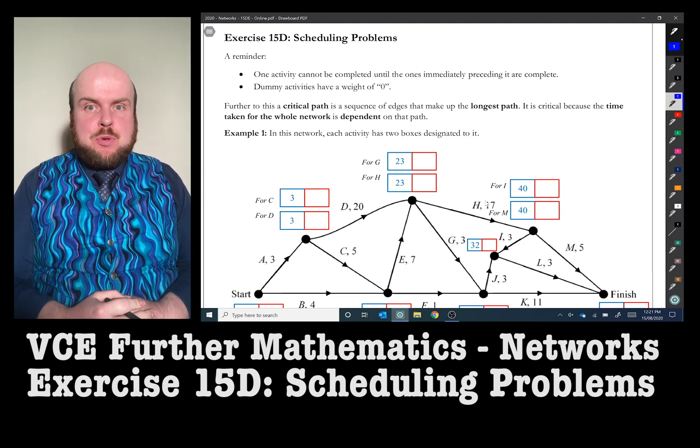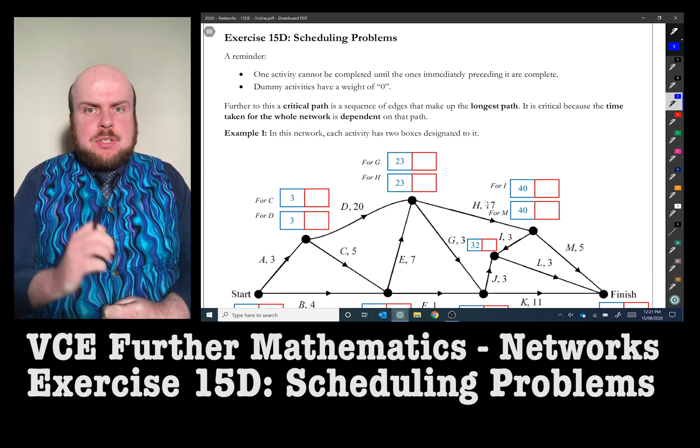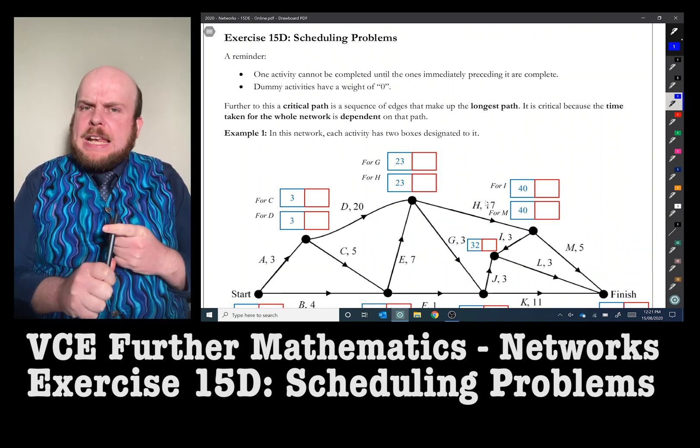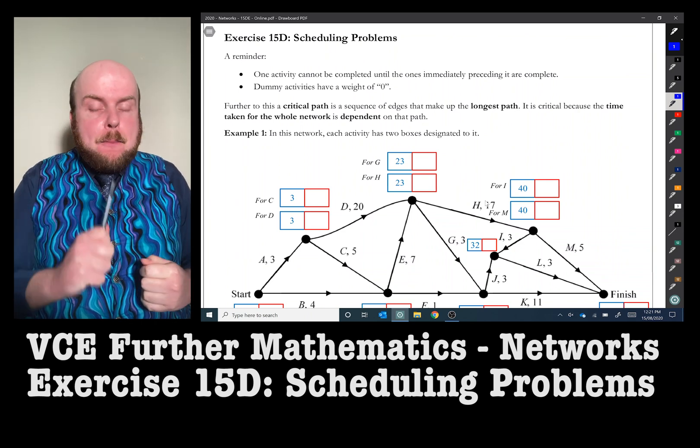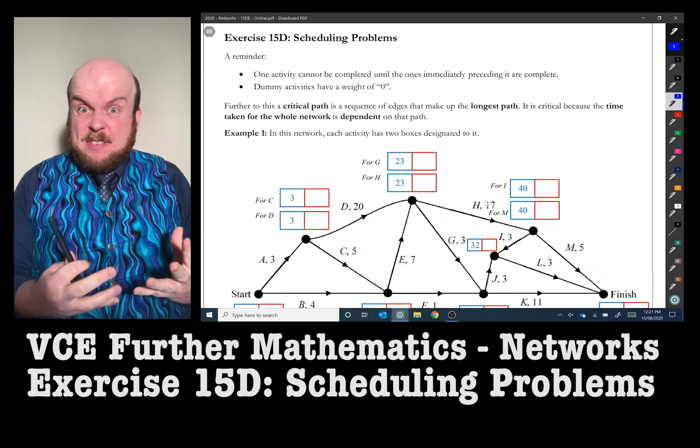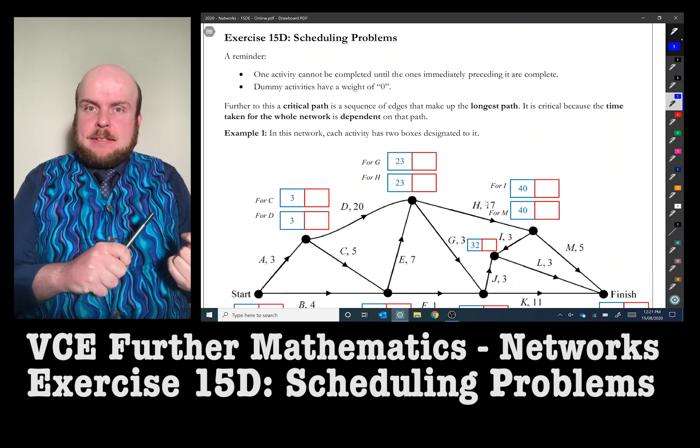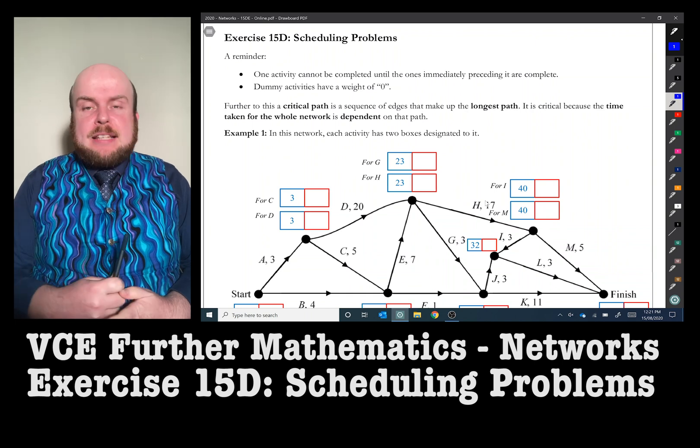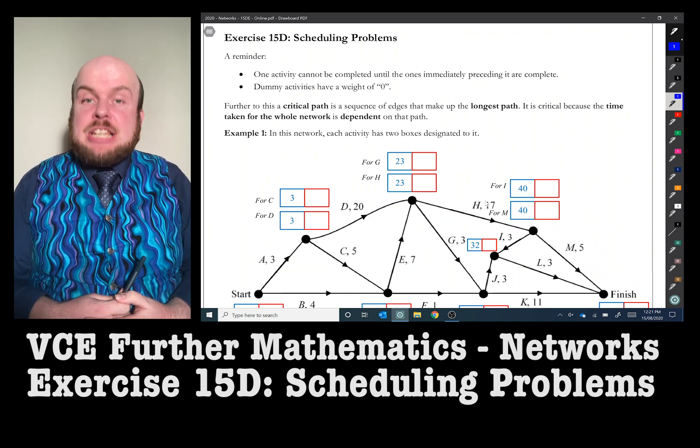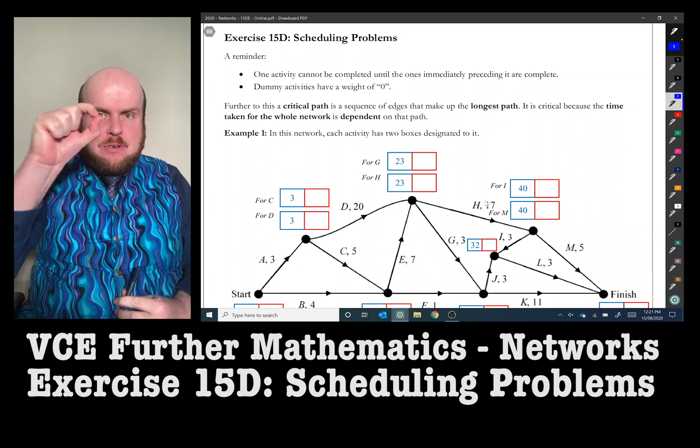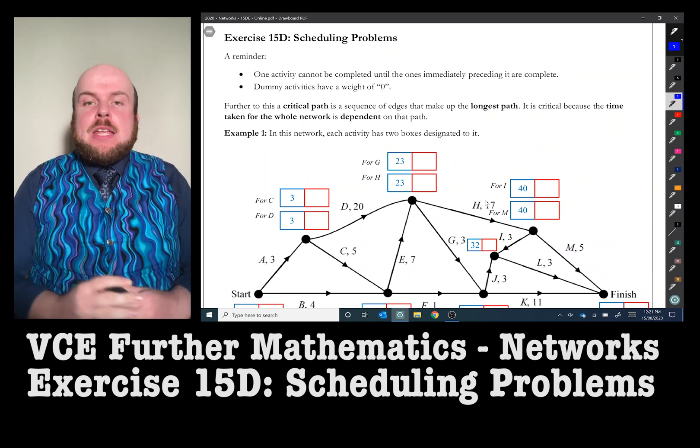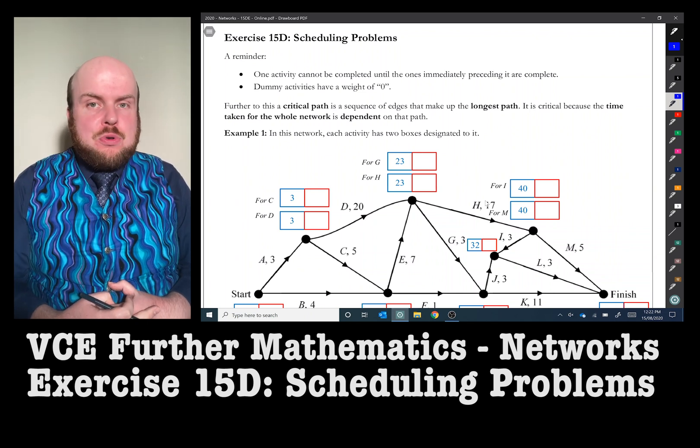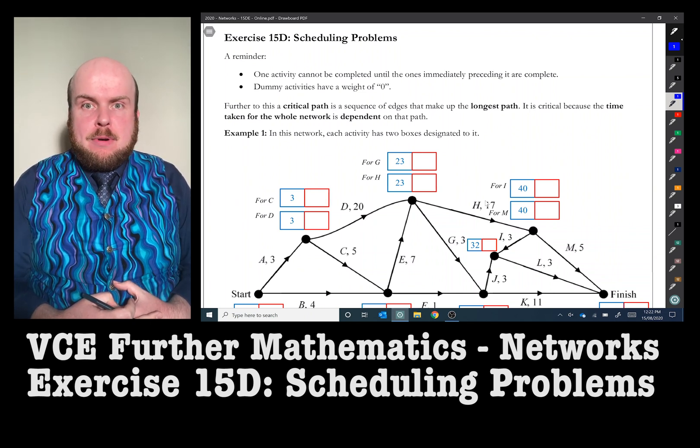Exercise 15D Scheduling Problems. Just to recap from exercise 15C, it's worth remembering that one activity on an activity network cannot be completed or even started until its two predecessors have been done, or two or three or four, however many predecessors it has. The second thing to remember is that any dummy activities have got a weight of zero, nada, nothing. So when we're finding the total amount of time a project should be taking, those things need to be reminded of.